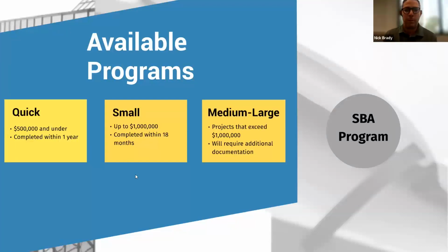The Small Business Administration has developed a program to help small businesses obtain bonding when the contractor wouldn't normally qualify within the standard marketplace, whether that's due to personal credit, insufficient working capital, stressed financials, or lack of experience. This program can be used for projects up to $6.5 million in size. We use this program often, and it's a tremendous resource for our small contractors.